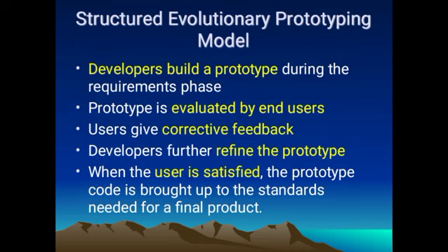Structured evolutionary prototyping model. Developers build a prototype during the requirement phase. Prototype is evaluated by end users. Users give corrective feedback. Developers further refine the prototype. When the user is satisfied, the prototype code is brought up to the standards needed for a final product.